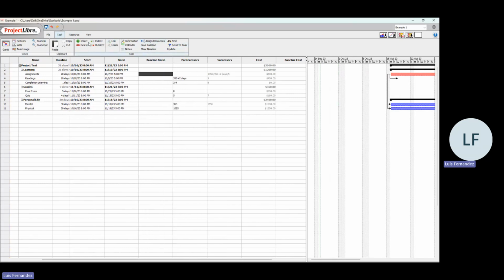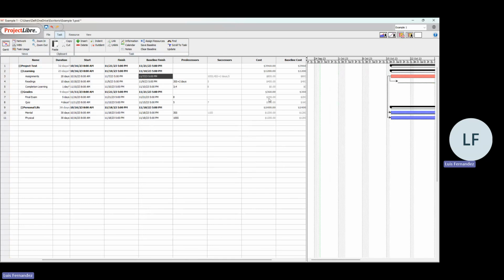And set the baseline again if we decide to change a little bit after getting the times, and then we consider that the times are not working for our resources. Well, we can set a new baseline, we can override it and click OK. And now we have the baseline of the cost, because now we are taking into consideration what we have.